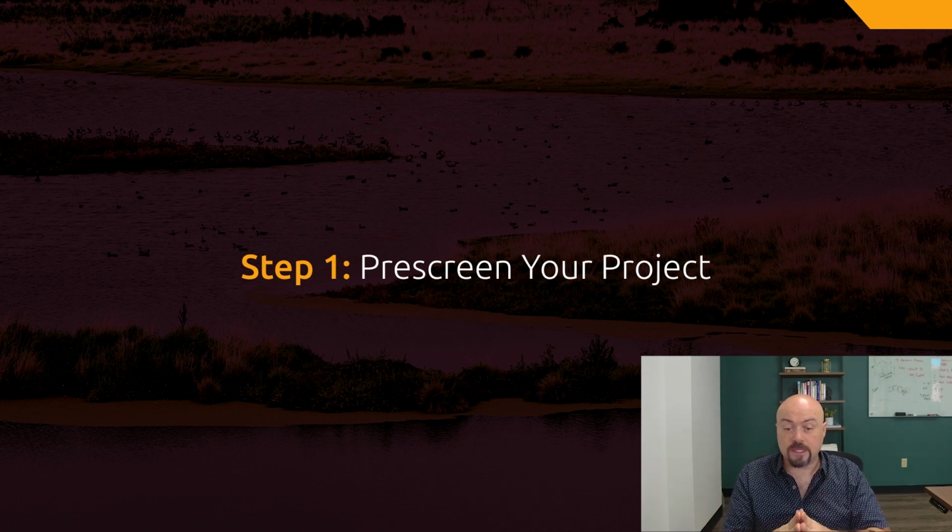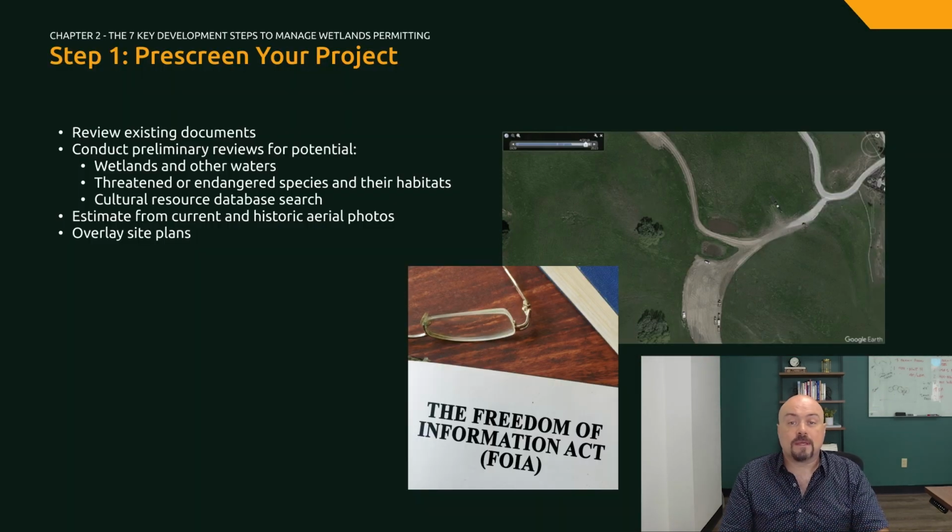It is important to complete this step if you are assuming that you have approval, because your local government will want proof if you apply for a development permit, and if a state or federal agency learns about unpermitted improvements after you install them, they could penalize you on top of requiring a permit. Such penalties could include removing the improvements or paying higher mitigation fees. On the other hand, you may confirm you already have permits through this exercise, but still may be required to follow certain conditions to complete your improvements.